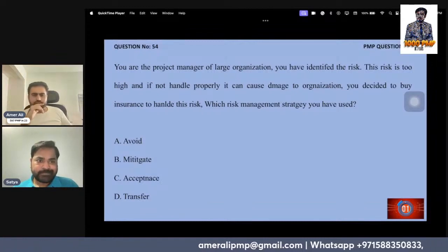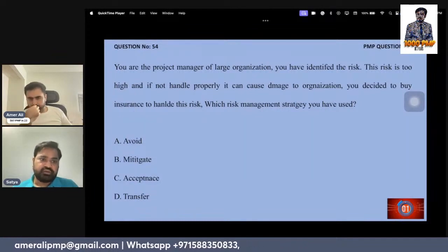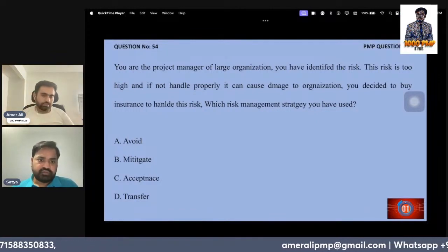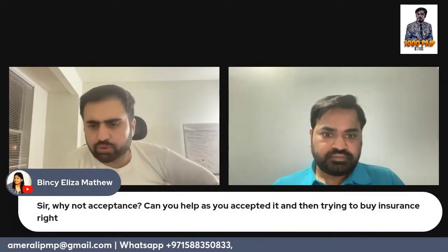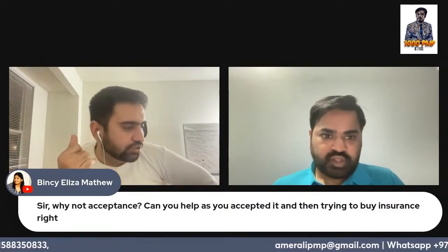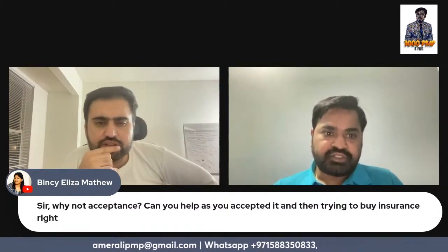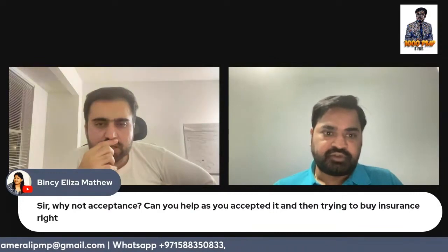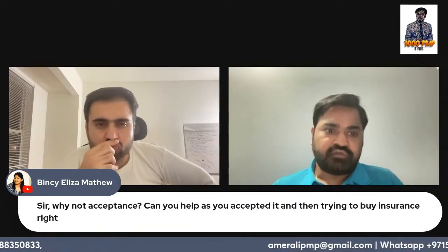How would it have been avoid? If they do not do the work, or if they don't take it over, like do not give it to a third party or do it by themselves, then avoid. Okay. Don't do it at all. Okay, so why not acceptance? If they do it by themselves, say the organization did the work by themselves, or if they accept the risk and go forward and make a plan to work in response, that will be accept.